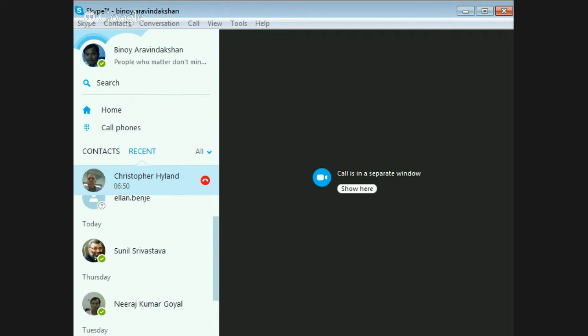The variations are also looked at, and a variation order is a signed amendment to the contract, and it may increase or decrease the scope, the time, or the cost. So in our column up the side here, we have a list of signed variation orders. The red is actually a saving, and the blue is actually a cost increase. Whether that's logical or not, I'm not sure. So we need to report on those because you're working within an overall budget for the project.